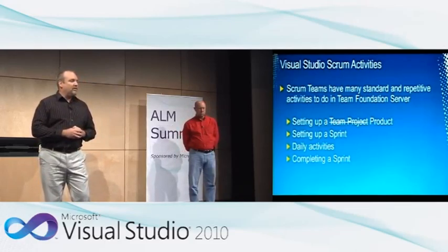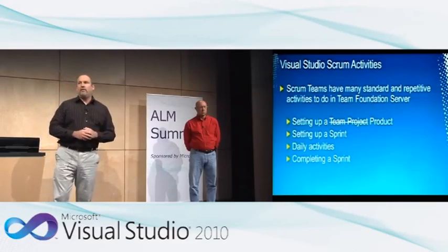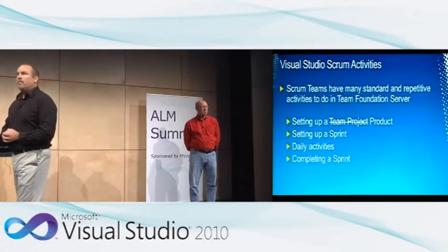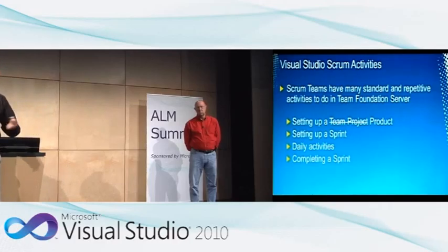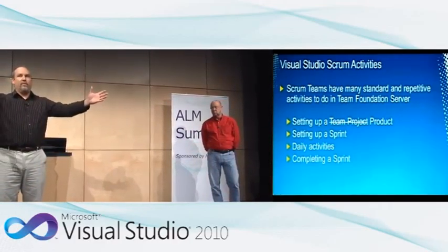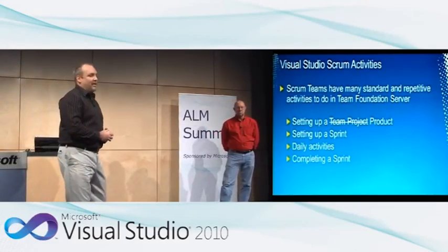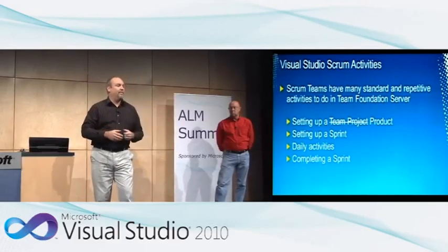The daily activities, really Scrum doesn't say much more than have a 15-minute daily Scrum where you synchronize with the other team members on what you're doing, what you've done, what's in your way. And then 7 hours and 45 minutes of go forth and do the right thing, right? Create an increment of working software and deliver business value at the same time.